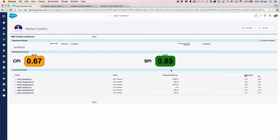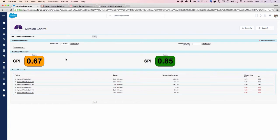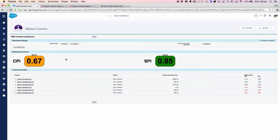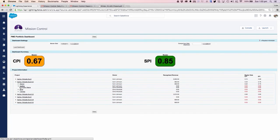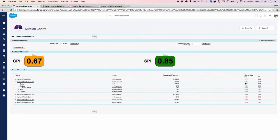We get the high level indicators of our CPI, which is our cost performance index, and our SPI, which is our schedule performance index. That lets us know how our projects are performing at a real high level. Ultimately, we're wanting them to be one or above. One means they're running exactly to cost and one for the SPI means we're running exactly to schedule. Anything below that, we give you an indicator and you're able to drill down into the individual projects, milestones, and actions to see the individual CPI and SPI data for each action.